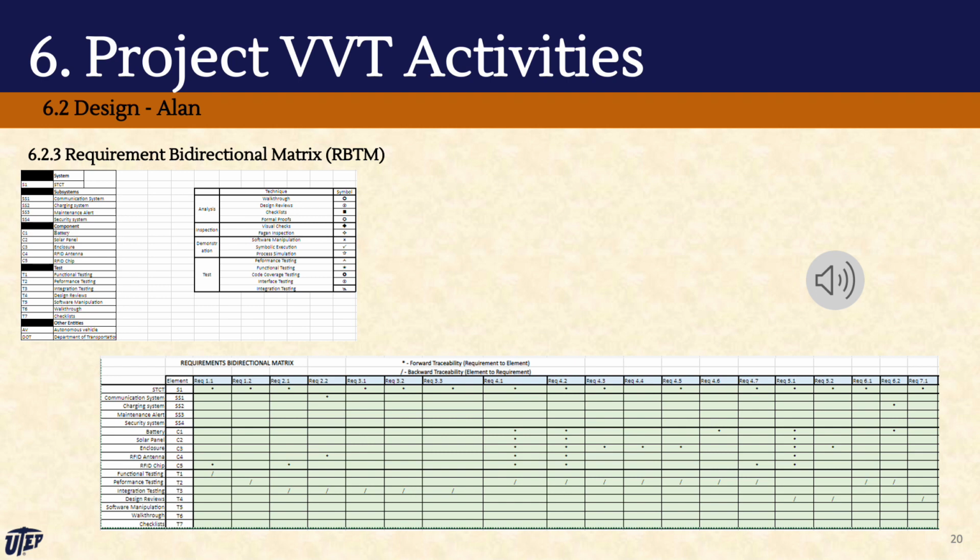The bidirectional traceability matrix and checklist also allows you to measure alignment of design with requirements. This helps make sure that the functions are in line with your requirements and are in fact necessary, or if your requirements have been accounted for. Specifically, for the STCT, we had a good balance of requirements that were backwards and forwards traceable, which will help us in the later stages of development for verification and validation purposes. Some of our requirements were at the system level, but we chose to have them also be traceable at the component level to be more easily traceable when the time arose to verify or validate the requirements later.